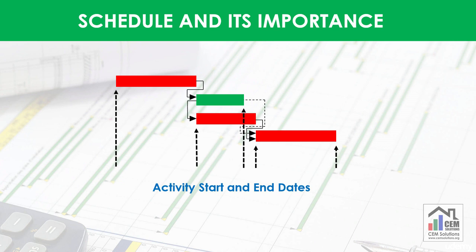Schedule gives start and end dates of activities. These dates are important for the contractor for timely purchasing of the materials, timely starting the material approval process, managing the resources, and to plan execution of activities to avoid any delay to the project.